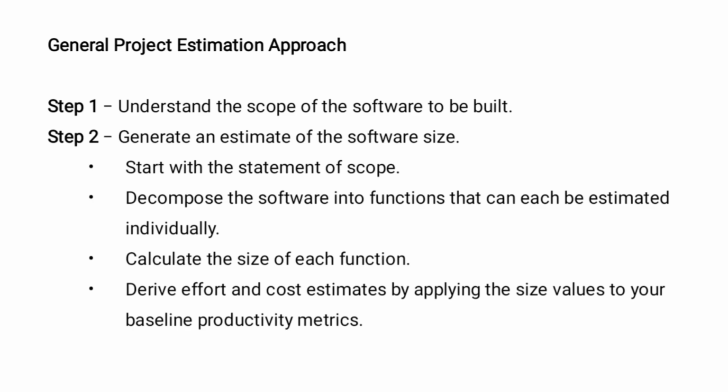General project estimation approach. The first step for this is understand the scope of the software to be built. Second one is generate an estimate of the project software size. To estimate the project for a software size, first start with the statement of the scope. Then decompose the software into functions that can be estimated individually. Calculate the size of each function. Derive effort and cost estimate by applying the size values to your baseline productivity metrics.